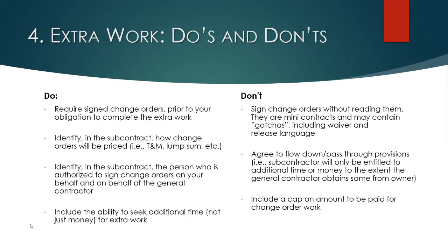Lastly, in terms of the don'ts related to extra work and change orders, do not sign change orders without reading them. It sounds very basic and somewhat silly to even say that, but it happens. And as I mentioned earlier, there are many contracts and they may contain some gotchas, including a waiver and release of any pending claims that you may have leading up to that point.